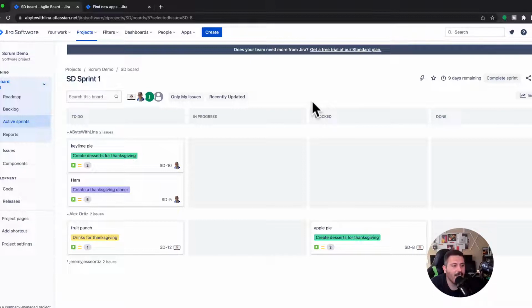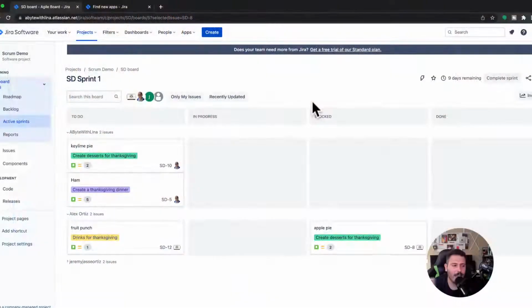If you don't have it and you're not a Jira admin, I recommend this is something every project should have. You need to have some way of capturing impediments. You can't just talk about them, you have to capture them, whether in that Confluence thing we showed earlier, or in a particular status like I have here. You can also do priority.